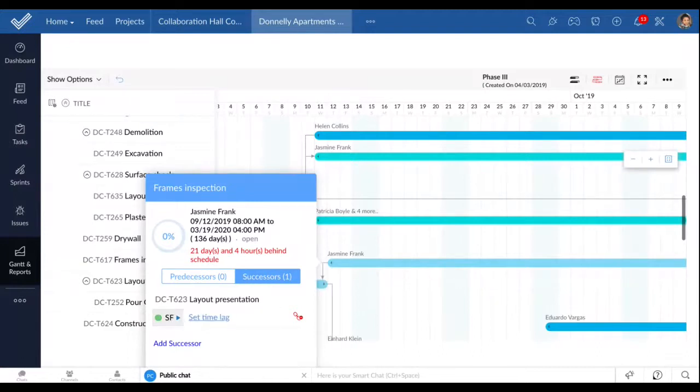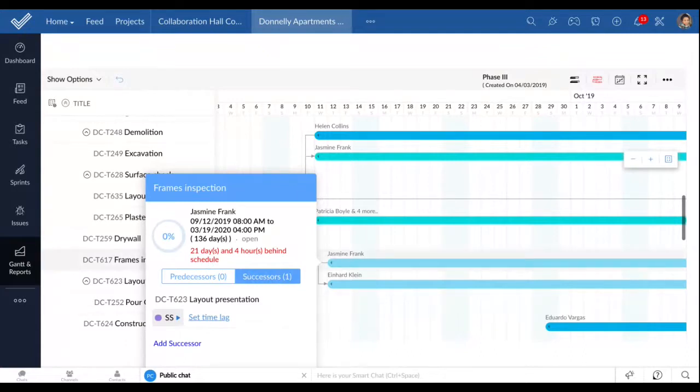And if you want to, you can just change the dependency type. And when I changed it, do you see the alterations that have already happened on the Gantt? It wasn't like this before, right? Yes, now it's gone. So based on the type of dependency that I choose, so this is start to start, which means both the successor and the predecessor, both the A and B tasks of this dependency should start together. So that is the logic.